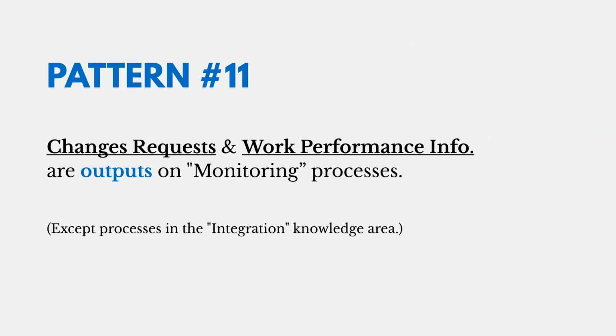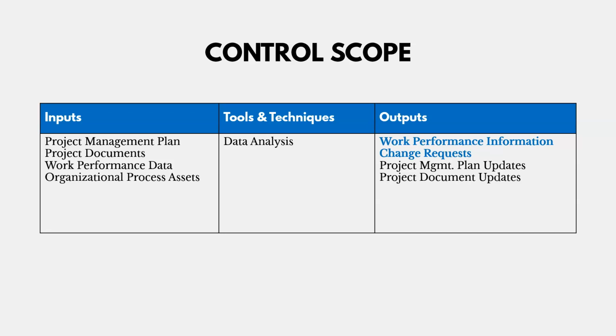And the 11th pattern is kind of an add-on to that. Change requests and work performance information are outputs on those same processes, those monitoring processes. So we're taking work performance data and turning it into work performance information. And based on our analysis, a change request may be needed if something's not going right on the project.